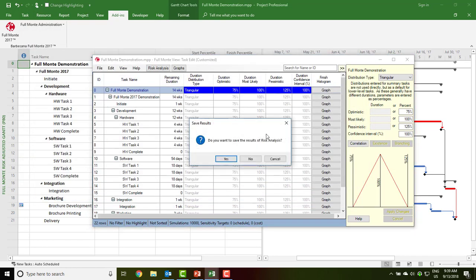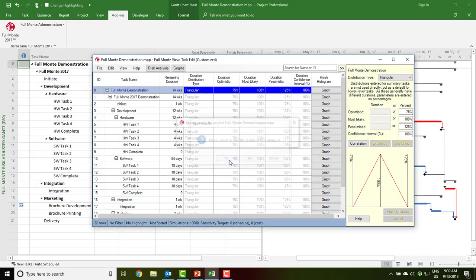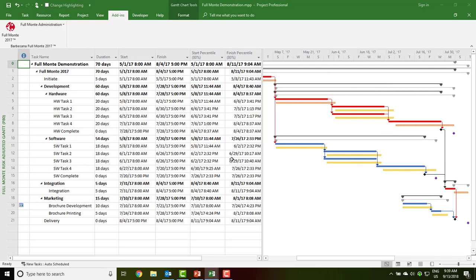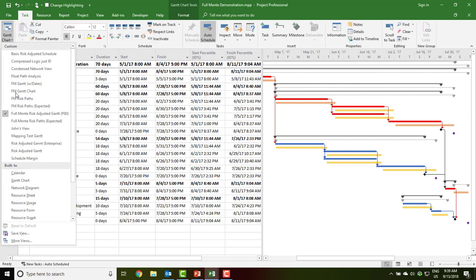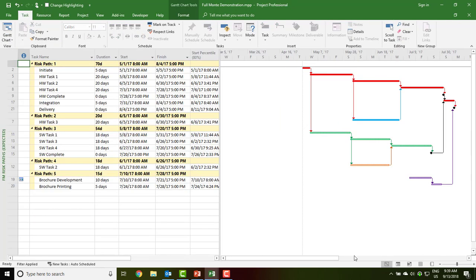Full Monty can save data back into Microsoft Project custom fields, which we can use to produce custom reports inside Microsoft Project, including a risk path analysis, where we can see the primary critical path after taking into account uncertainty through to the final delivery milestone. We can also see the secondary, tertiary, and so on critical paths affecting the final outcome.